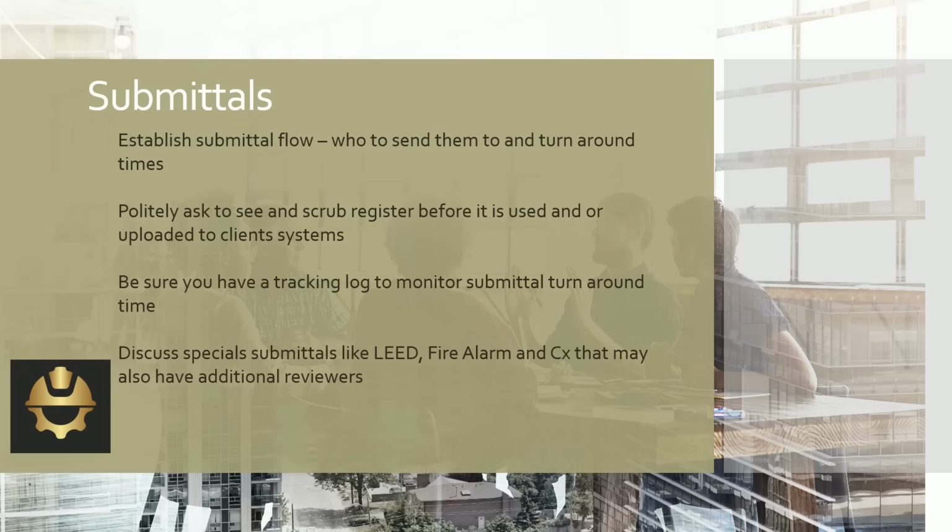So the one additional step that we haven't talked about here that I think is really important is once you've scrubbed the register and you have buy-in from the designers, you have to propose that to the entity you're working for, whether it's the Corps, the GSA, the Department of Energy, NIST, DPW. Even if it's a large corporate owner, they have to accept that. So once everybody is on the same page, that's why it's super important to do this early, that gets loaded into the system that everybody has agreed upon for tracking submittals.